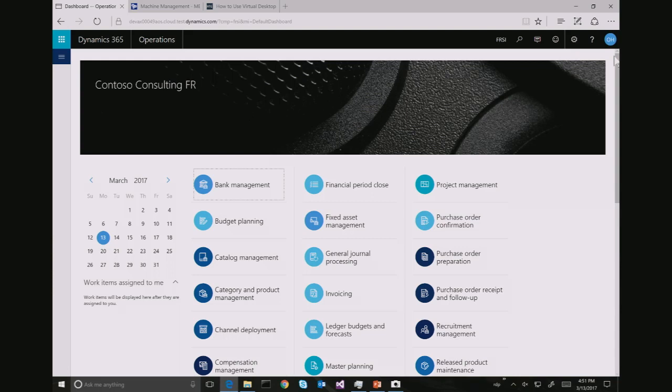Yeah. So each resource can have only one default role at any given time. But that is the default role. In any given project, say the project requires a role of driver, but resource Thomas has a role of some other thing. If you want to assign Thomas as a driver to the project, that's totally fine. It's more in the lookup, when you're looking up to see who's available. So then you search on the skill, not the role, basically.